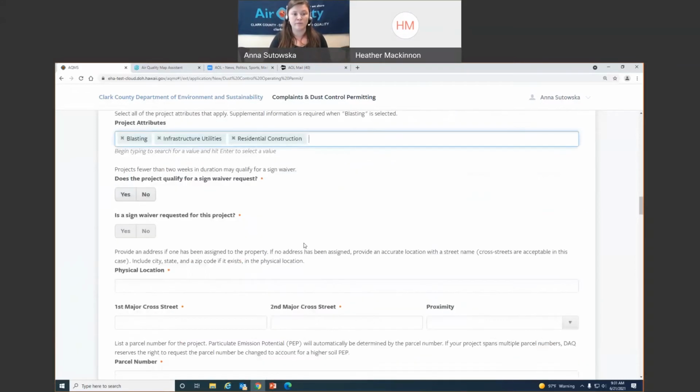Does my project qualify for a sign waiver request? If your project duration is 2 weeks or less, you can request a sign waiver. If your project is less than 2 weeks and it's clear that it is, we're going to accept it. So here I'm going to say no because mine does not qualify. If I had said yes, then it would give me the option if I want to request a sign waiver.